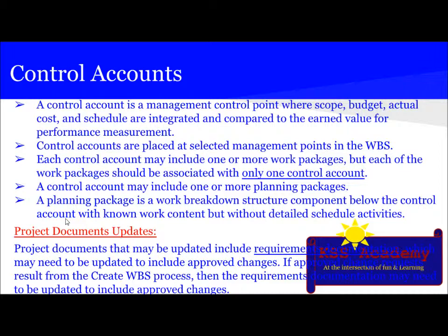Then planning package is a WBS component below control accounts with known work content but without detailed schedule activities. And it is also the basis for rolling wave planning, which we have already read in the past slide. And the baseline is approved estimate plus any approved changes. So at the end, the scope baseline contains WBS, WBS dictionary, and project scope statement.